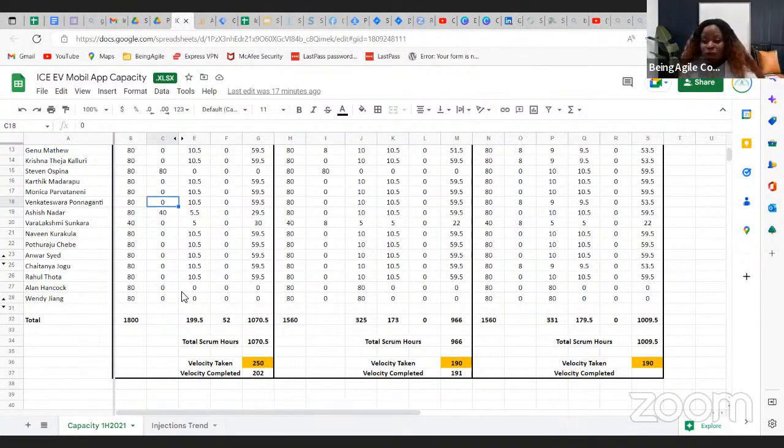The way this really works in real life is if you are a full-time, permanent employee, they will have to take into account the time that you will be on break, because definitely you will not be doing work while you're on break. Maybe your break time per day is 1 hour, and then the other 0.5 hour is you just lazing around, not being useful. So we want to be that realistic. Factoring all of that, we can safely assume that we only have 6.5 hours for every employee.